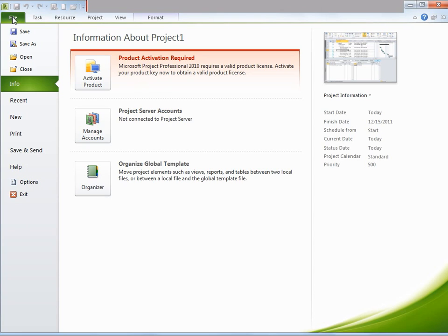In case of manual and automatic scheduling, the duration of summary tasks is calculated based on its subtasks. The time difference between the earliest start date and the latest finish date of subtasks determines the total duration of the summary task, which is automatically scheduled. An automatically scheduled task is switched to a manually scheduled task if either the duration is modified or its start or finish date is changed.